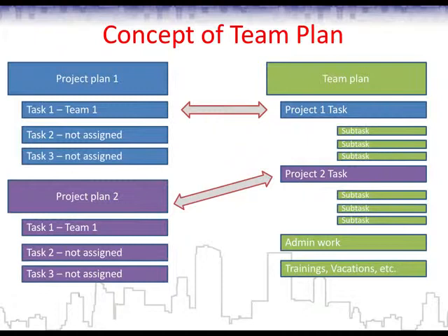And of course, this team plan should also incorporate other activities like administrative work, trainings, vacations, maybe proposals, meetings, going to some clients, a lot of things that are not planned by project managers in their plans, and maybe are not even part of any of the project plans. But still, they utilize the team members' time, and it should be planned and calculated in the workload of the team.